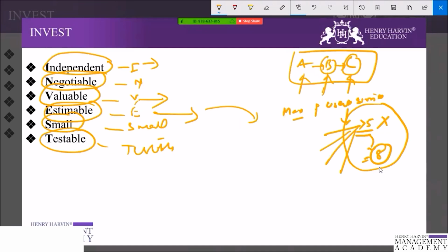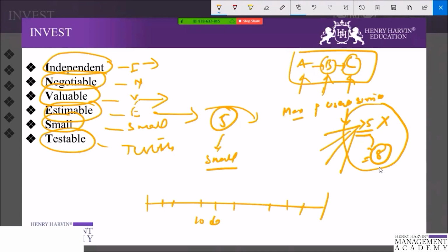So, if there are 5 developers, and you're not prioritizing your stories or breaking them into smaller sections, what will happen? If the sprint is for 2 weeks, and there are 10 days in this sprint, you will get all the stories to the tester on the 8th day, and they will pile up on the very last day. Then the team says that they are not able to complete the user story because they were not able to test the user story.